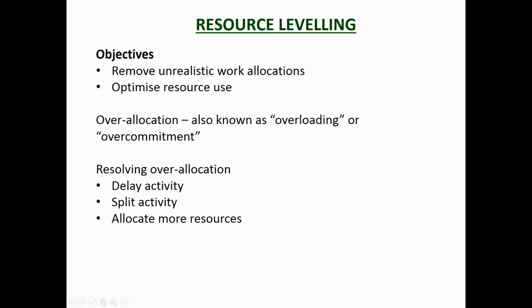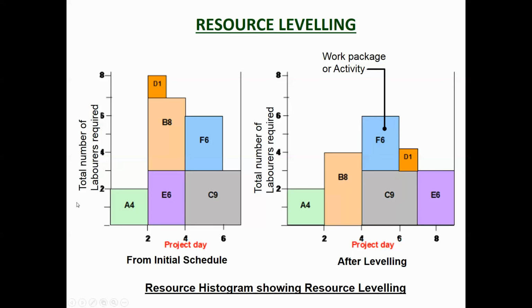Now another reason you do resource leveling is to get consistency in resources. So you can see here you've got a couple of labourers come on site, then you need 8 labourers, then you need 7, then you need 6, and so it's all over the place. So by moving the sequence around a bit, you end up with 2, then you bring 2 more on, and then they get consistent working, then 2 more, and then you start dropping everyone off.